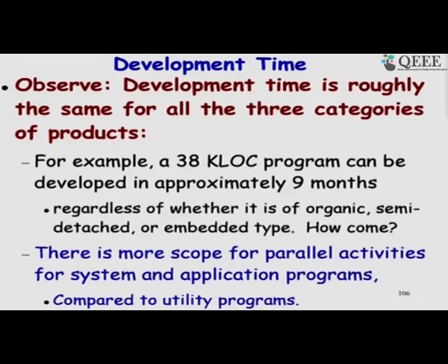But now in COCOMO 2 we have different sets of expressions. Initially take the function point, later on take the lines of code, and also more parameters are considered later on to get more realistic estimates. So, to answer the question in short, the estimation is done throughout the life cycle. It starts at the beginning of the project where we get a very rough estimate, and the project manager keeps on estimating and revising the plans, getting more and more accurate estimates.